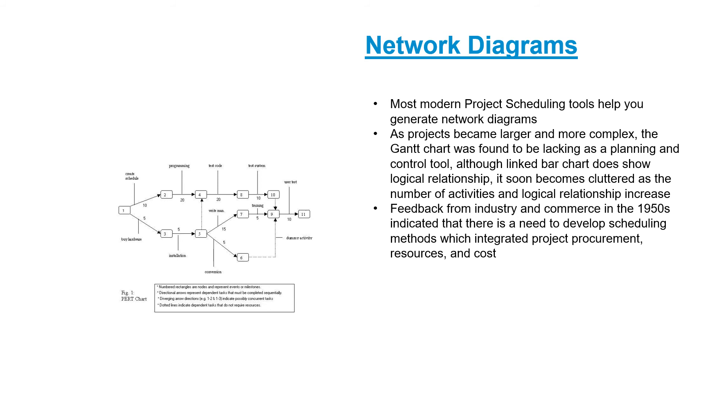Now as projects became larger and more complex the Gantt chart was found to be lacking as a planning and control tool. Although Gantt chart does show logical relationship it soon became cluttered as the number of activities and logical relationships increased. So a typical project could have up to 500-600 activities. So using a bar chart to indicate the relationship it becomes very difficult to read and comprehend. So usually what we do is at a higher level we prefer having a network diagram to have a bird's eye view of the project and its key work packages. And for detailed micro level planning we would prefer to use a tool such as the bar chart.